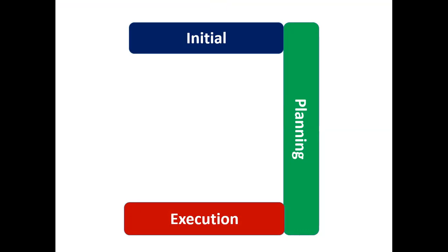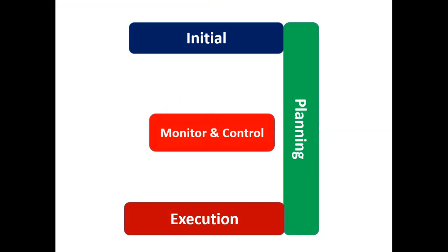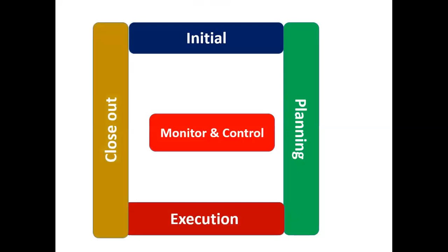You have to implement your project plan. And during the execution phase, you have to carry out monitoring and control. You have to record the data: what is going on at the site, which activity is going to start, and how many man-hours it is going to take. There would be templates. You will develop all these templates in Excel, and then you will shift them to the site guys. They will maintain the data, and you will produce reports to make all the stakeholders aware of your project performance. Okay, and then there would be the closeout phase.